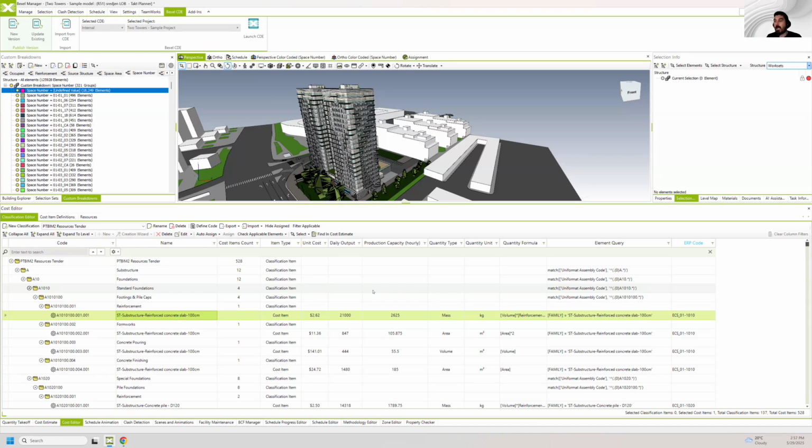Because of this, investment in integrated BIM is the best way to lower these risks to the maximum possible level. And that's why I'm explaining to you the technology behind this, and that is that you simply have your cost classification mapped to the model elements. Whatever happens to the model elements, whenever they change, it's going to be reflected in the quantities, it's going to be reflected in the resources needed, it's going to be reflected in the unit price, and you're going to have a very, let's say, robust data layer that supports your product.